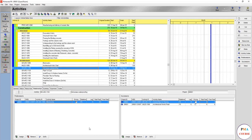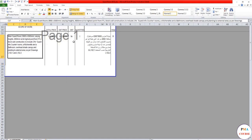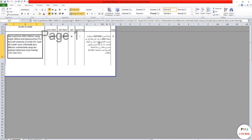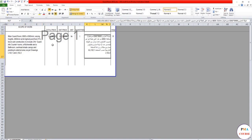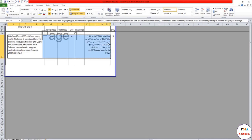You should always look at the POQ, the bill of quantities, the priced one. This is an example of the POQ. It's not detailed, as you see there's another language here indicating the project is in an Arabic country. As you see, there's the main guard room, and you're reading only the description. It's only one line item, which is not perfect at all. You should have one for finishing, one for facade, one for structure. This one alone could have about 100 line items to describe each activity.